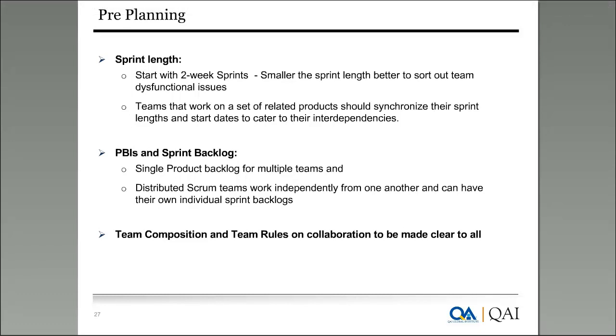Sprint length. Preferably a smaller sprint length, because especially when we are working in a distributed agile team, there could be lots of dysfunctional issues that can crop up, and a shorter sprint length will make them appear and become visible faster, so that one can take corrective action.